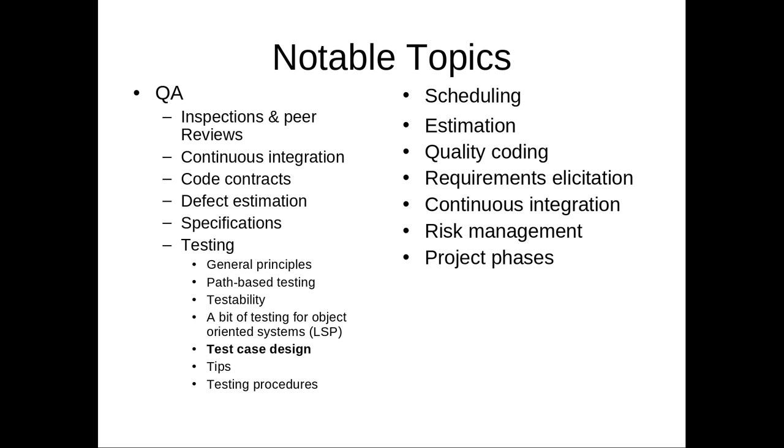Depends. Evidence suggests it actually rises, and it rises exponentially. Why is that? Why would the amount of work required to fix a defect go up as time goes on? Because as time goes on, you're working with a system that has bugs, and therefore you're just making more bugs to the bugging system.